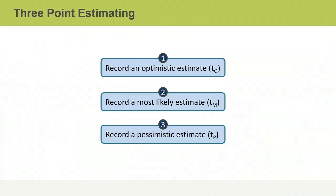Three-point estimating is one of the most accurate methods of estimating activity durations. To create three-point estimates, you begin by performing three steps. First, you record an optimistic estimate that reflects the estimated duration if conditions are very favorable. Next, you record a most likely estimate based on typical conditions and historical information. The third step is to record a pessimistic estimate based on how foreseeable negative conditions might delay an activity.